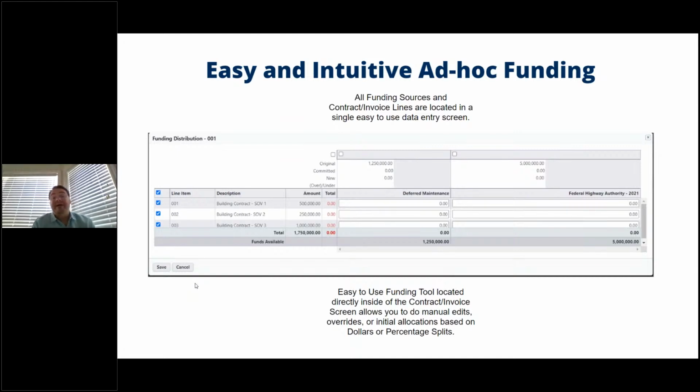And as we get into the detailed value of those SOVs, there could be 95% of the lines that are very simple and get into a rule, but then 5% of those lines get a little complicated because they deal with special endowments, and materials purchases that only specific funds can be used for. And this person building this hospital wanted a very big statue, which is these 3 line items, and these funds can only be used on those 3 line items. So I need a quick way of attaching those in a way that makes sense to a construction manager and a project manager, of the type of money, the flavor of money, and the work that's being performed.